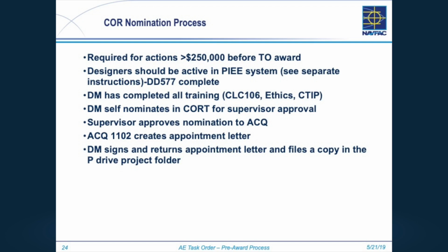PMs are not CORs. PMs are not CORs. The designer that's issuing the task order is the COR, because you are the one that's going to be managing the AE. You are the one that's going to be inspecting their invoices and saying, yes, we've got the product, and doing the design reviews. We're going to cover all that in the post-award AE training next month.